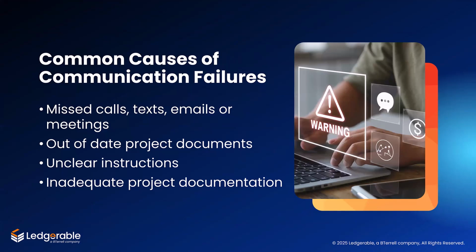Unfortunately, communications using many of these methods is ineffective when meeting attendees are unavailable or have connection difficulties, texts or calls are missed, and when emails are blocked or unnoticed. Another common issue is out-of-date project documents, which results in misaligned expectations or unclear or lacking instructions, which results in rework and delays. And then inadequate project documentation is another issue because it results in higher insurance premiums and increased legal exposure.